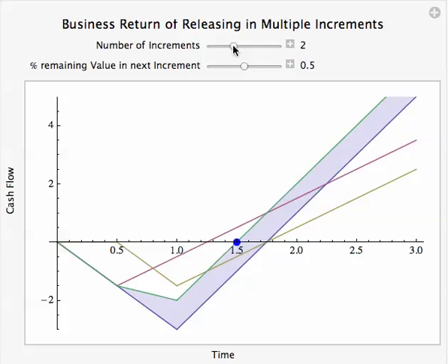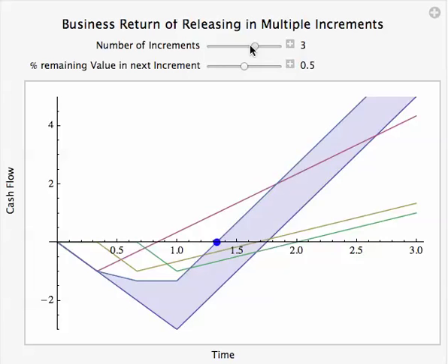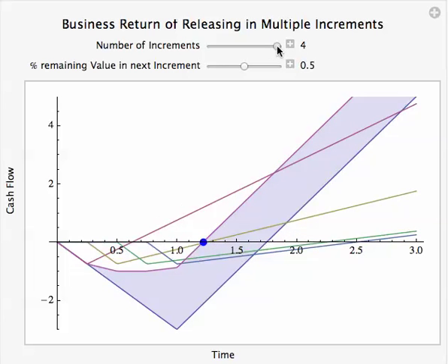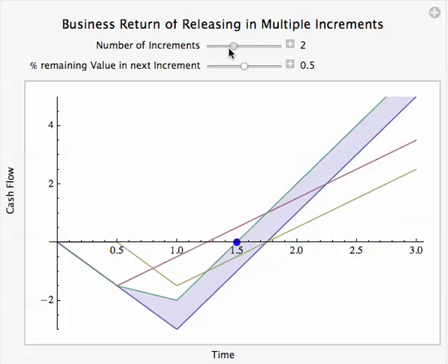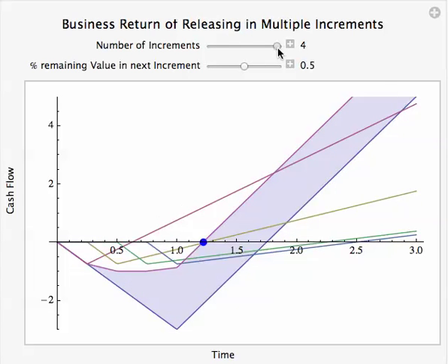If we take that to the next level, we can decide to deliver in 3 increments or in 4. And notice how the graph changes shape, and all the 3 different business benefits get accentuated. We have an even earlier break-even point, even lower net investments, and we are ahead with our net returns.